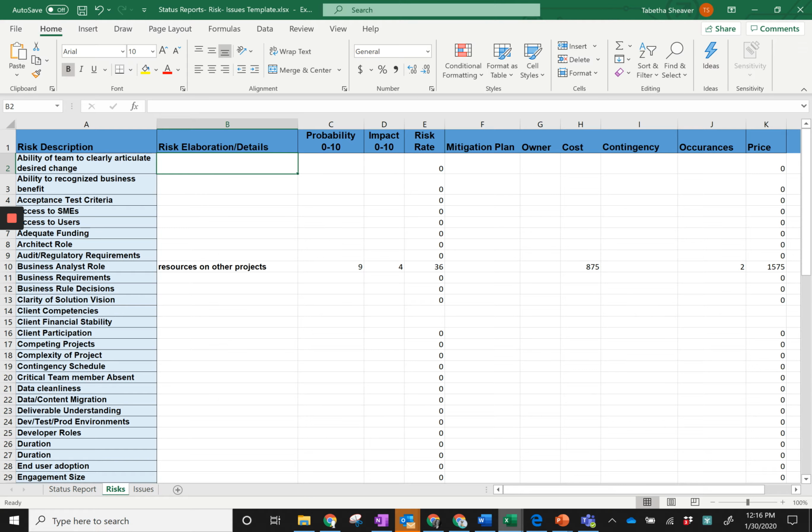Over on the left, anytime I've done a project, we've done a lessons learned, we've learned our lesson, we go in here and we add this. So this is a running template. I have identified a project and I've probably figured out most of my work breakdown structure, or what the things are that I'm going to do. As we discussed previously, there's a number of ways to do that, so look at the different estimating tools in that other video. But the next step is to really think through what the risks are.